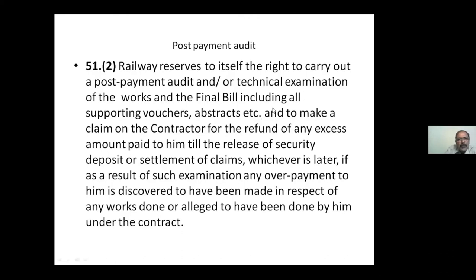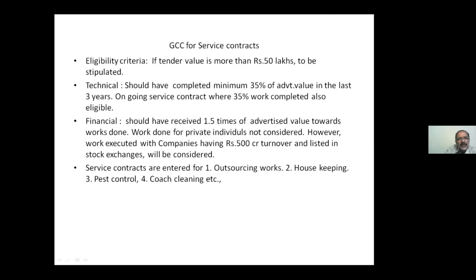Now here, GCC for service contracts, a special GCC is there for service contracts. For works contracts a separate GCC is there, for service contracts a separate GCC is there. Eligibility criteria, I already discussed in the beginning of the class. In service contracts, if the tender value is more than 50 lakhs, the eligibility criteria has to be stipulated. And the technical eligibility is, he should have completed 35% of the advertised value in the last 3 years.